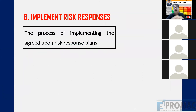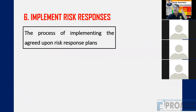All five processes so far were in the Planning process group. The sixth process moves into Execution: Implement Risk Responses. Now we actually execute — we make sure that whatever responses were planned are really being implemented.